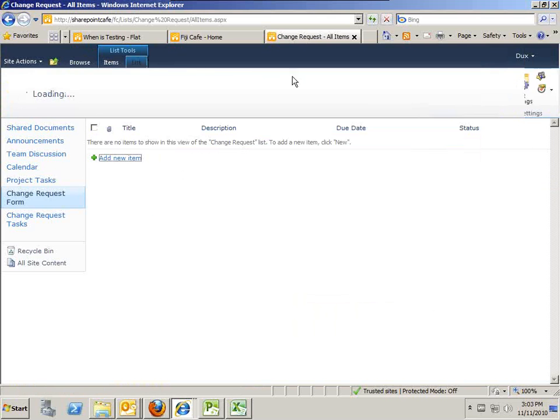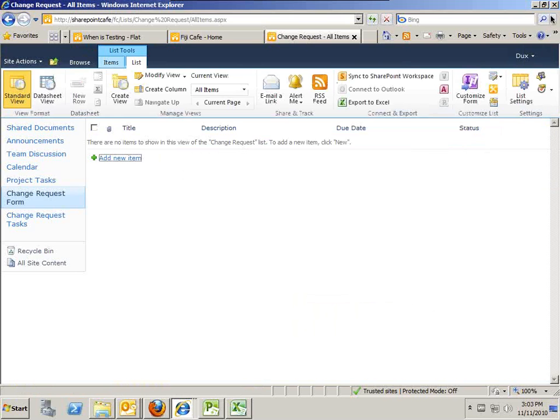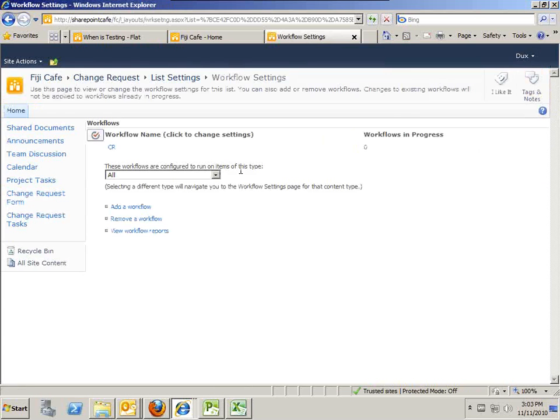We can put rules as project managers to say, okay, if a change request was submitted, go ahead and contact the PM. Once the PM reviews it, it will be sent to the change control board. And once it gets approved, all this communication will happen. Now, that cycle of communication can be automated other than email, because you can tell the system to start alerting this person or start doing this or the other. But in addition, it's documented.